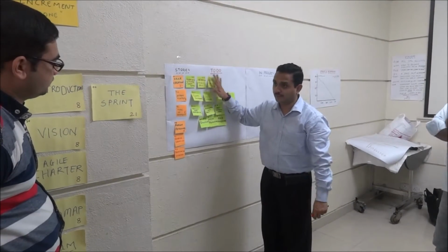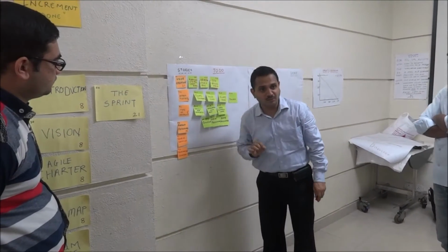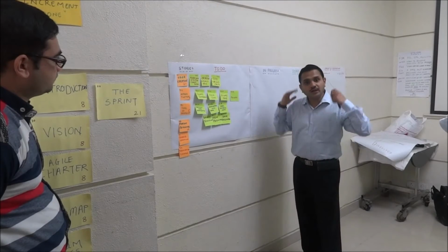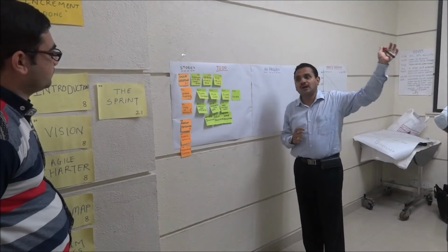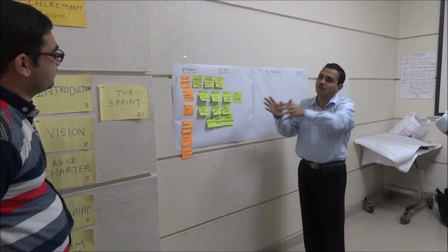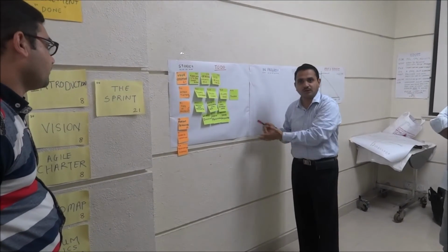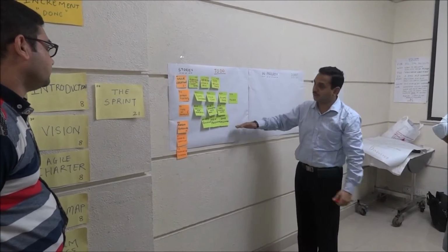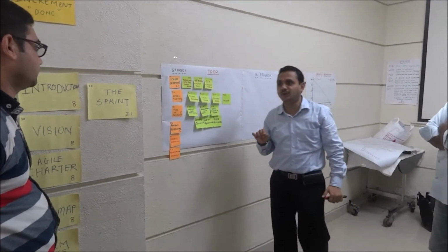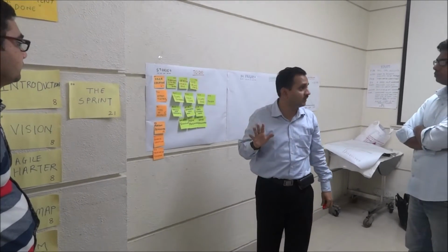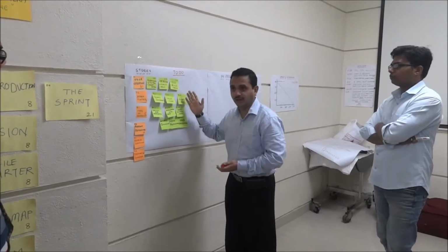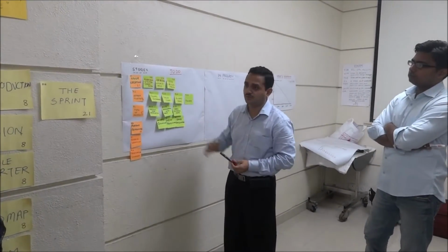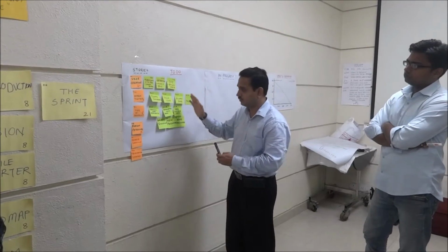This gives you clarity. Now during the sprint planning meeting, you already have a lot of clarity on these items. You have already discussed them for maybe the last 2 months, before you came to the point where you are going to run an 8-hour meeting for a one month sprint, for example. In the 8 hours, you already know a lot of things. So you have done tasking. Maybe in the first couple of hours, 2 or 3 hours, you will do tasking.